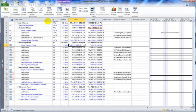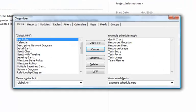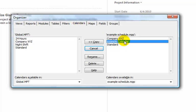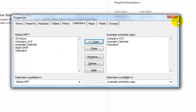You can copy calendars using the Organizer. Go to the File tab, select the Organizer button, and then go to the Calendars tab. You'll see the Example Calendar we just created, and we can copy that into the global template that comes with Project, so that every time you create a new project file you'll have the option to select this existing calendar. Click Close because it's now added into the Global MPT file.